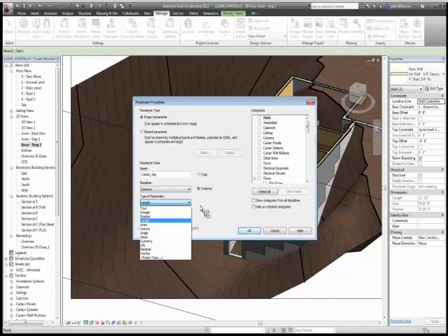And the reason I kind of like that kind of relationship after I've done this a couple times is that then I can say, hey, I am now at like stage 100, and I can say hide everything that's greater than 100. That'll hide everything that's in the future. So similarly, when I get to step 150, I can hide everything greater than 150. And that way I'll show everything up to 150, but I'll hide everything with a number greater than that.